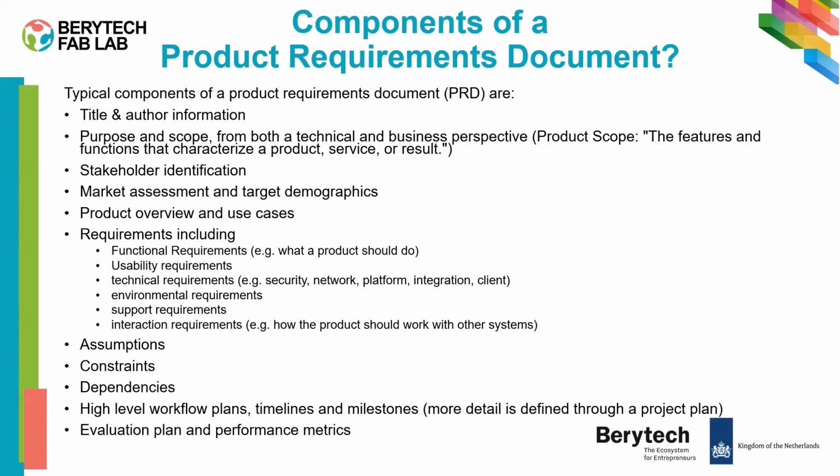And the requirements include the functional requirements, the usability, how it will be used, the technical requirements, the security, the platform if we have software, the environmental requirements: is it recyclable, is it a one-time use, is it toxic to the environment. The supporting requirements: how are you supporting the client, do you have maintenance contracts, all these details.